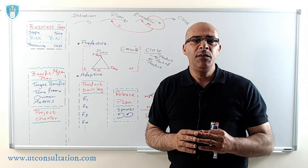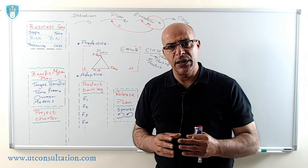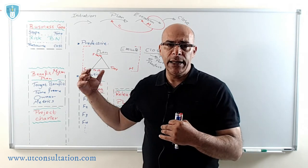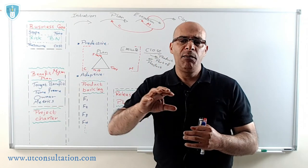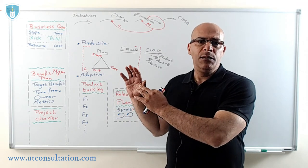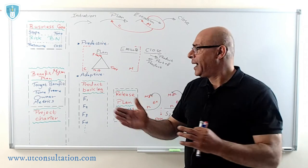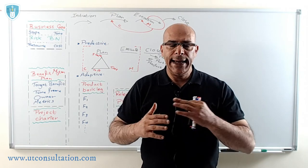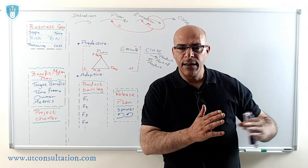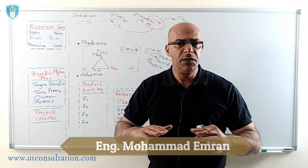In some projects you cannot prevent a high frequency of change requests. Therefore in these projects — like IT projects, information technology, research and development — there is a probability of high frequency of change requests. In this case, it would not be correct to choose the predictive life cycle to manage this project. We go to another approach called adaptive. Adaptive means flexibility, and it handles high change request frequency. Predictive lifecycle and adaptive lifecycle use different workflows, different tools, different templates, different skills, etc.